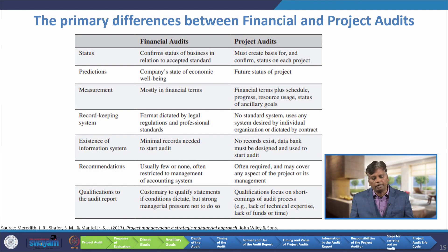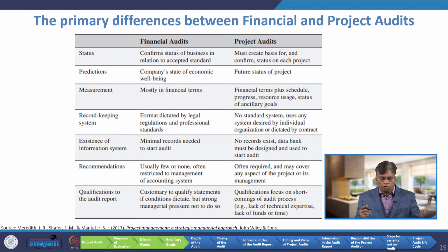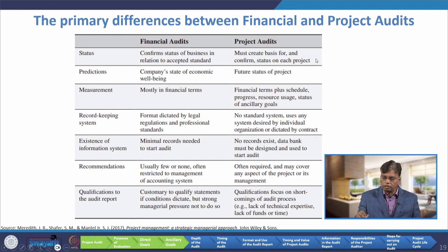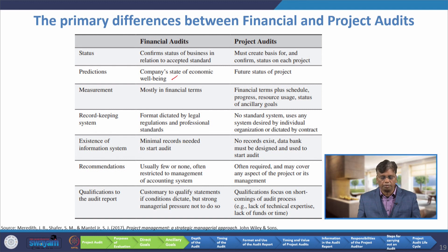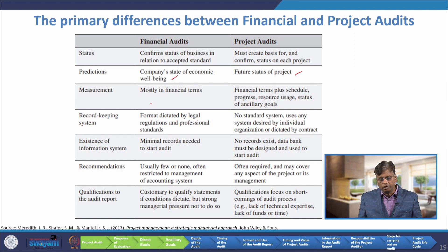This table compares the differences between financial and project audit. With respect to status, financial audit confirms the status of the business in relation to accepted standards, but project audits must create a basis for and confirm the status of the project. With respect to predictions, financial audit predicts the company's state of economic well-being, but project audit predicts the future status of the project. With respect to measurement, financial audit measures only in financial terms, but project audit measures financial terms plus schedule, progress, resource usage, and status of ancillary goals.